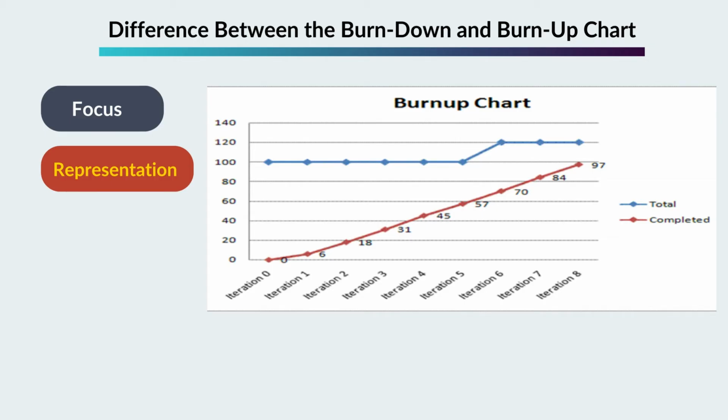of work completed, while the x-axis represents the time. The chart starts at 0 and shows the increase in both planned and completed work as the project progresses, creating lines sloping up from left to right. Purpose. The burn-up chart is used to create a holistic view of the entire project, including the planned versus achieved work. Transparency. It helps stakeholders see the bigger picture of the project's journey.